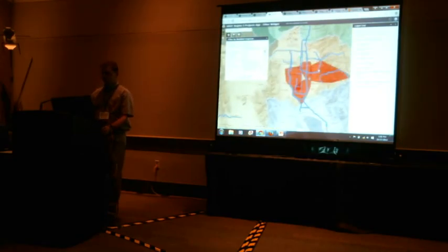So just graphically or visually looking at this, I can see these projects right here likely could be assigned to him. However, some of these resident engineers overlap boundaries. And so if I look at Sean Lambert's here, his blue ones over here and on this one over here also overlap. So maybe either of those two guys could be assigned to this. So this could be a useful planning tool for our district engineers to see where they need to assign the resident engineers to help with construction projects.